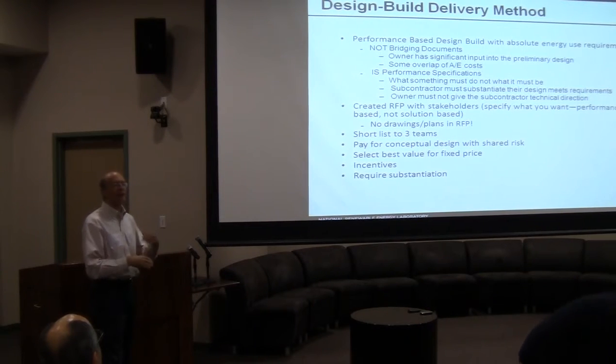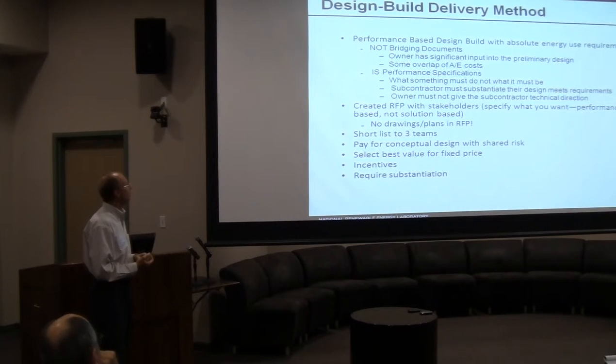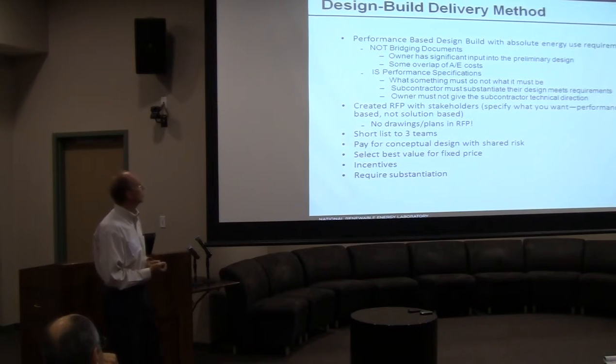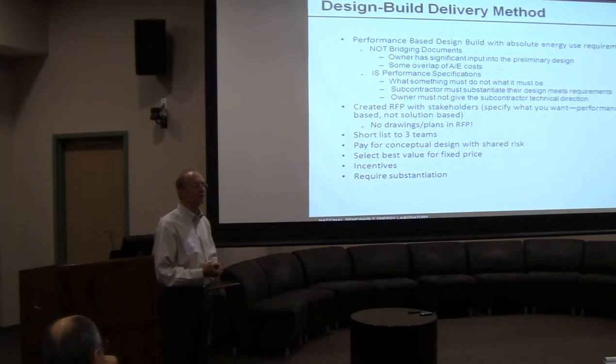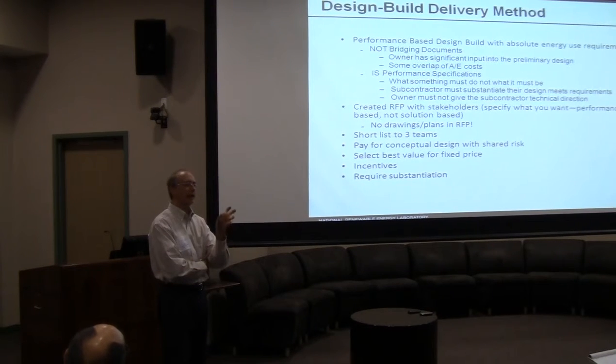But the other part of it is by the time a team gets that far, they're pretty heavily invested in that design, and they're going to want to move forward with it. But they did pick and choose some other ideas. And so, as I mentioned before, we selected the best value for that fixed price. Now, there was an off-ramp in there, if you want some of the nitty-gritty details, where they were allowed to go back and complete a little bit more design work before signing up for a guaranteed fixed price. But what it did allow them to do, the moment that first contract was signed, they went out and procured the concrete, the steel, and some of the big parts.